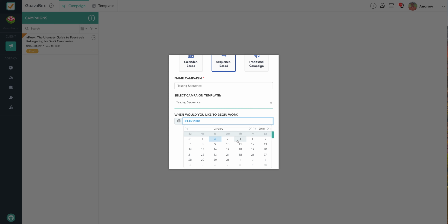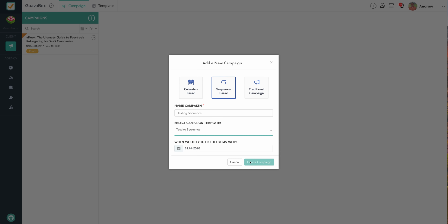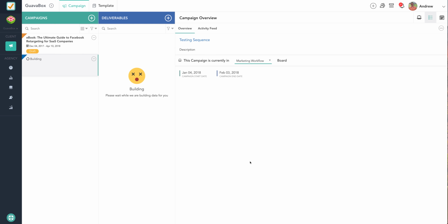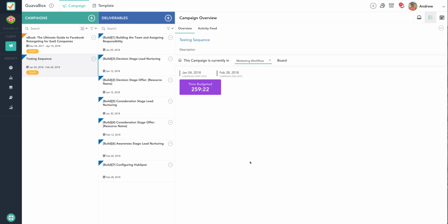So let's say I want to kick off this new project on Thursday the 4th. I'll click that and I'll hit create. Now it's going to begin to build out my campaign. It's going to look at that date of the 4th. Then it's going to say, okay, what's the first task due inside of this campaign? And it's going to place the due date of that task as the 4th. And then based on the relationship of that due date with the deliverable publish date and the rest of the deliverables inside the campaign, it's going to calculate every single deliverable publish date and then all of the task due dates inside of each of the deliverables that are inside of the template.